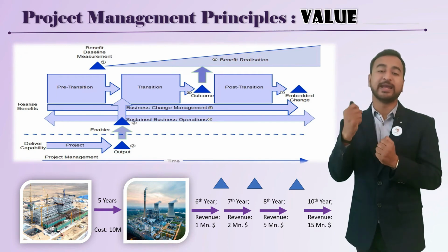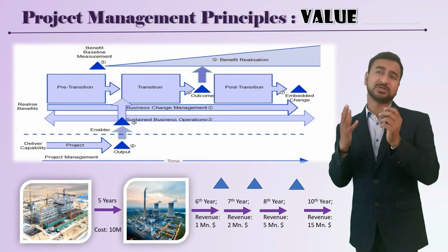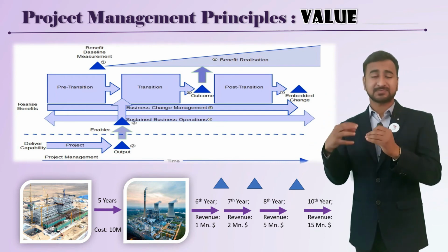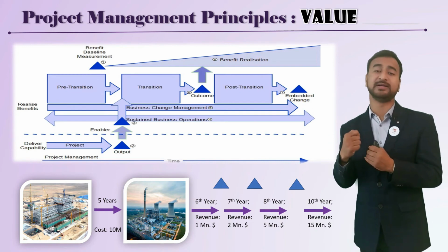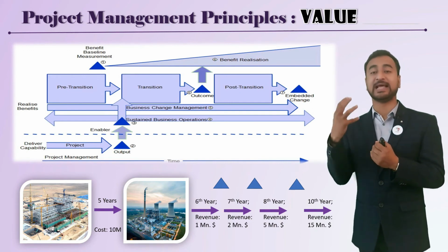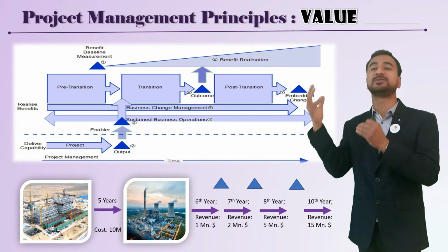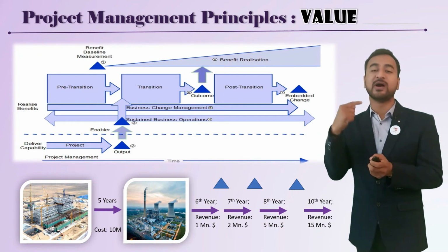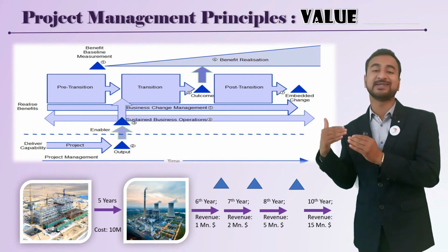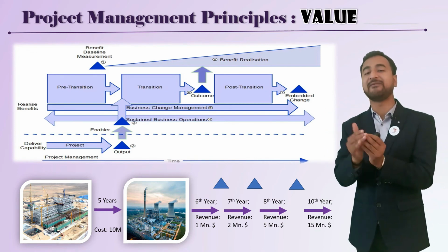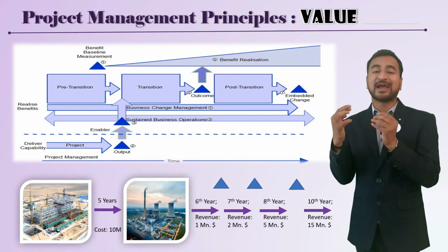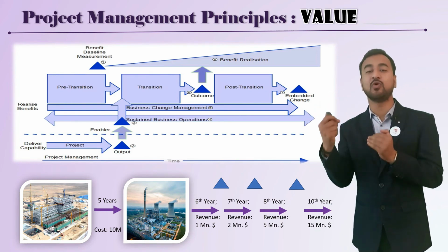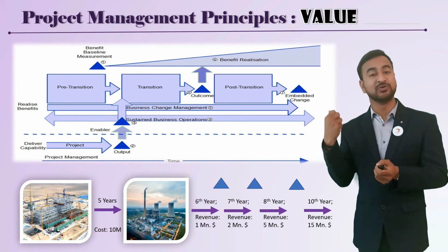That is the principle they want to indicate and give more priority. Earlier it was okay to measure project success by achieving the iron triangle, but with time, the need of the hour is to focus on more value delivery that helps the organization flow in a direction to achieve the strategic objective. As a project manager, it's your responsibility to map that value and measure whether you are achieving it or not. If you think you are not aligned with your strategic objective, then without being emotionally attached to the project, you should discuss with your PMO and stop investing in a project which is no longer achieving that strategic objective or value delivery.